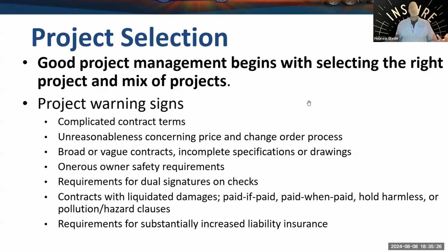Sometimes those two different teams have different cost mentalities, in how they assemble costs and how they deal with labor on the cost. That's usually where the problem is: the person who does the labor thinks one way, and the person who does the project management thinks another way as far as how the field will roll. And that becomes a function of productivity on the project, which could impact your project in a negative way if your productivity is not per the forecast in your estimate. So you want to make sure that's executed in a way that makes sense for you.